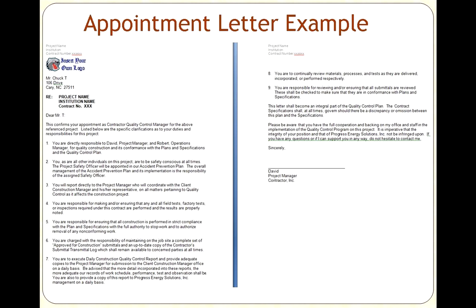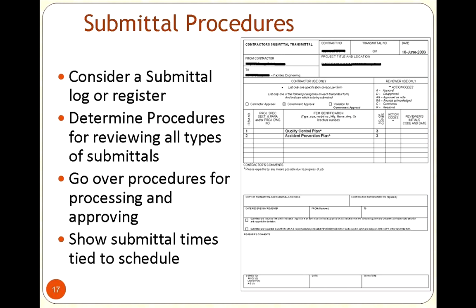So let's talk a little bit about, I mentioned that this gentleman deals with getting documentation and submittals. For example, he says, you are responsible for reviewing and ensuring that all submittals are reviewed and checked to make sure they're in conformance with the plans and specifications. So let's talk a little bit about submittals of documents. You may want to consider using some kind of documentation, whether it's a log, a spreadsheet, or a registry of some kind, but essentially this would be one of the things that the contractors would fill out.